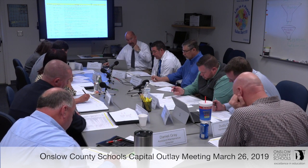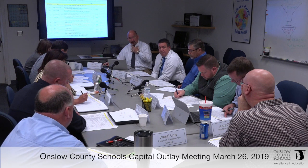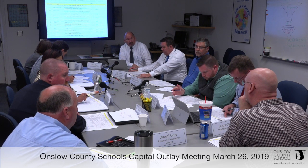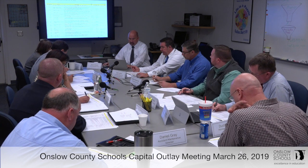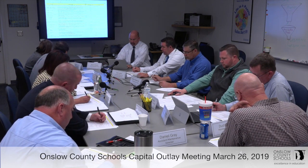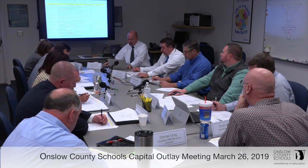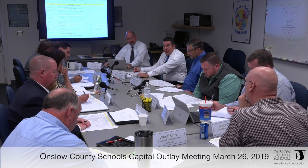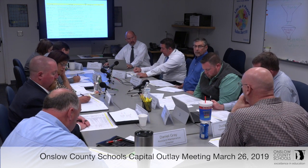The way we had it in the capital improvement plan was that we were going to do parts of it over the next 5 years, because it was $150,000. Is that something you're still looking at, or do you need to do more at any one particular time? For the HVAC equipment, for the cafeteria and classrooms above cap, we could split it up, maybe do half and half. So it's a 3A. Window replacement was more on long-term capital improvement, but is that something that's needed now? I'd say 3B.